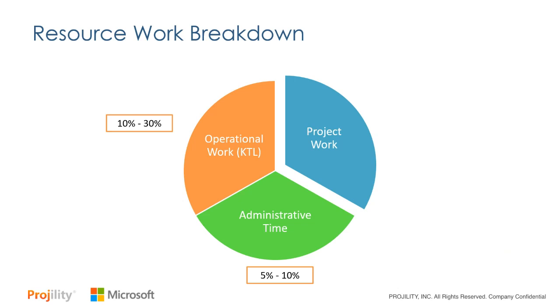It takes away from their ability to do any kind of project or non-project type of work. And we find that organizations, people spend 5 to 10% of their time doing administrivia as well as not working at all. The third kind of work, which is most prevalent in large enterprises, is project-based work, especially in IT organizations, where we see anywhere from 40 to 60% of an individual's time can be spread across different kinds of projects. And now, with the way the world is, with everything around different kind of methodologies, we have to look at the way people work.